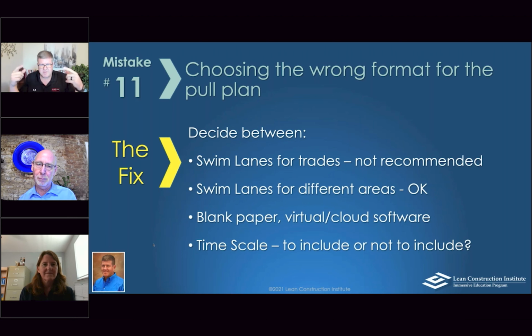So then you can put the dates in later, because a lot of times people get wrapped around the axle with the dates. Again, with long procurement items you need to have that thought process, like, I cannot get countertops until December 1st. So there are some elements where dates come in, but generally I like to talk about the high level, like, we just need to get this phase done by Christmas or by the 4th of July. Then work out the length of the train, and figure out what the dates are at the end. That's my general process.